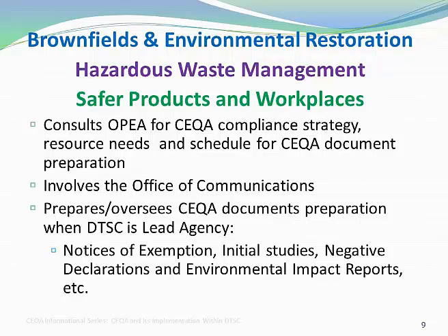DTSC core programs are responsible for conducting the CEQA-related activities that you see on the screen, consulting with our office to discuss a CEQA compliance strategy, resource needs, and a schedule for CEQA document preparation. In other words, the project manager works with the OPIA planner in arriving at a CEQA approach for the project that fits the circumstances and a realistic time frame for completing the CEQA process.